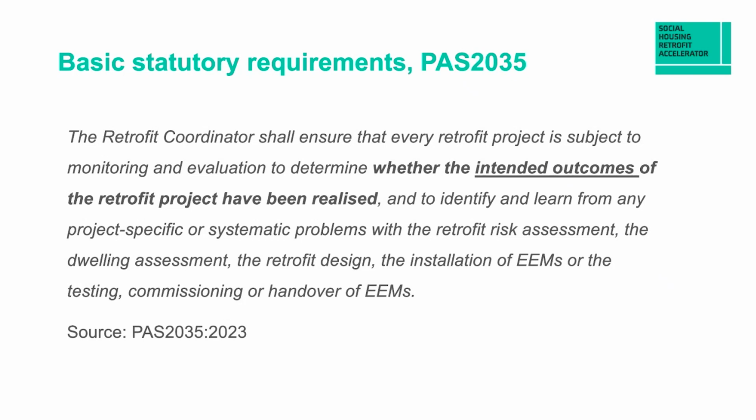element here around understanding monitoring, evaluation, and intended outcomes. So the retrofit project is subject to monitoring and evaluation, to determine whether the intended outcomes of the retrofit project have been realised, and to identify and learn from any project-specific or systematic problems with the retrofit risk assessment, the dwelling assessment, the retrofit design, the installation, or the testing, commissioning, or handover of energy efficiency measures. So that covers essentially pretty much the whole of the customer journey, or the retrofit journey.